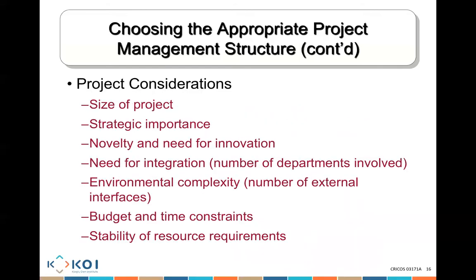Other things you need to consider when you're deciding whether you are going to have a matrix or any other structure. How big is the project? How strategically important is this project to our long-term sustainability? How much innovation and new things are required in that project? How much integration do we need? By integration, I mean all of these departments working together. How much integration do we really need, creating that strong integration to get the job done?